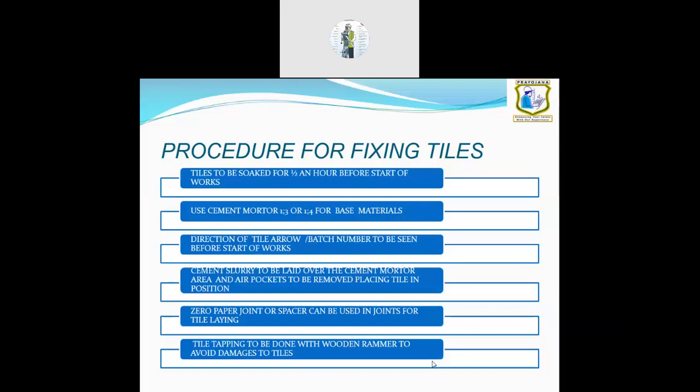So after this issue, our company said we will keep 10% extra for the next 2 years. Within these 2 years, if nothing happens, we will use this tile somewhere else. That is the correct procedure. This you have to manage, sir.